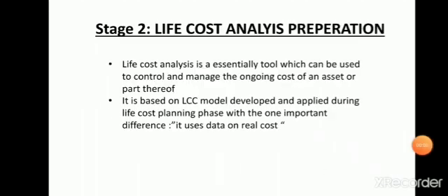The second stage in LCC is life cost analysis preparation. We developed a LCC model in LCC analysis planning stage, but with the historical data. But here we develop a LCC model with the actual cost and on a real-time basis. Here we use the actual data. Means using actual figures from similar assets from the organization, which the organization is using the